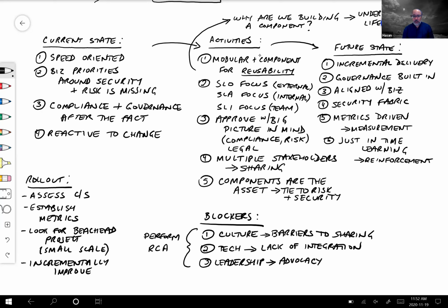If we have data, which we should, since almost every DevOps environment is generating data, but we are not a good consumer of that data. If we use that data in an appropriate way, take a very basic fundamental concept, if you're using any planning tools, we can estimate, and we can keep the actuals as well. The two things really help us to find out what is the cost of the things we are building.